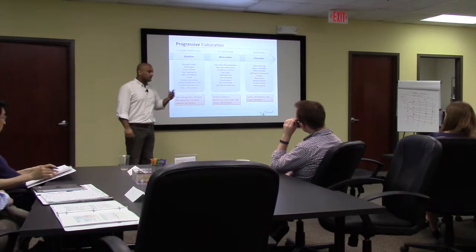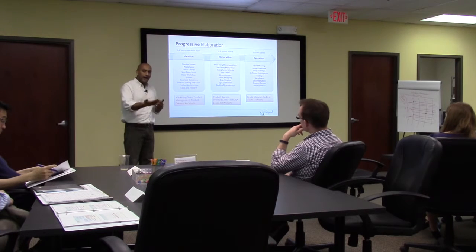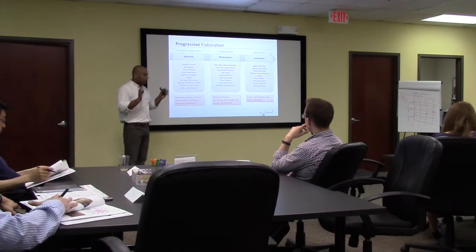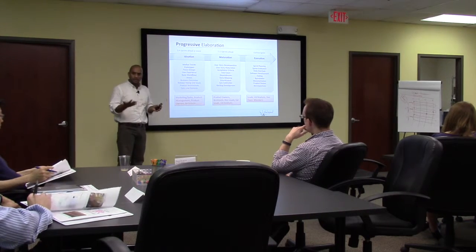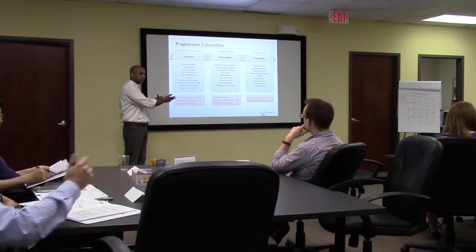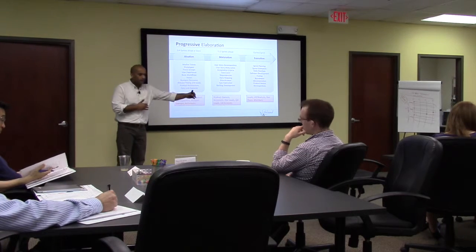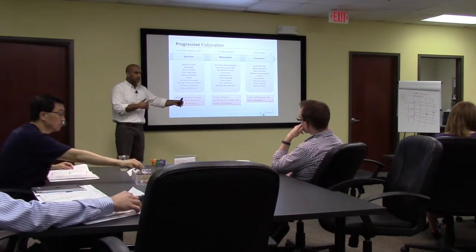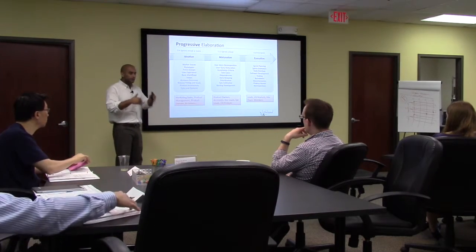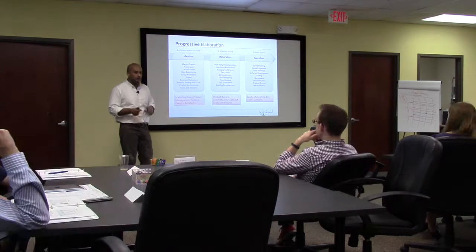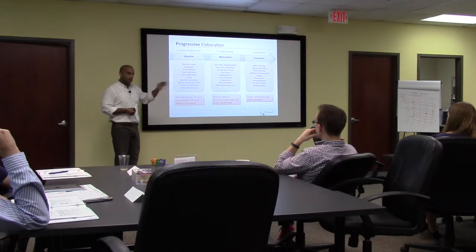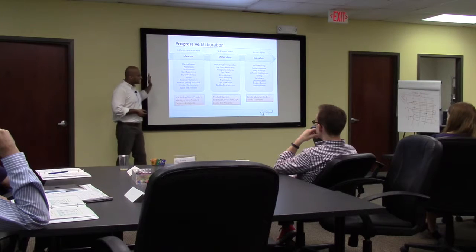Backlog grooming is this continuous process of how you add more detail to your product backlog. Typically, when you look at the big picture of how backlogs are refined, they generally have a 3-step procedure. You have a further line of sight, which is like 3 to 4 sprints ahead, and then you have maybe 1 or 2 sprints ahead with a little more specificity, and then you have what you're working on in this sprint. So when you look at continuous refinement for any project in Agile and Scrum specifically, it has 3 stages to it.